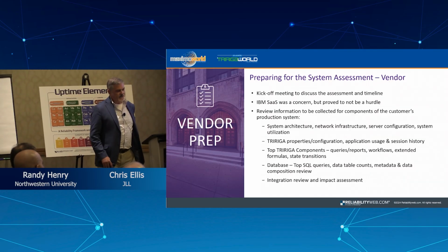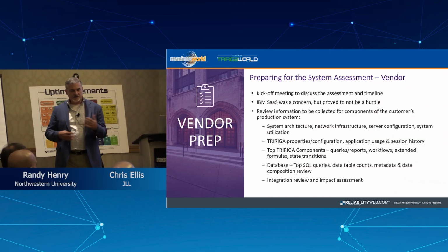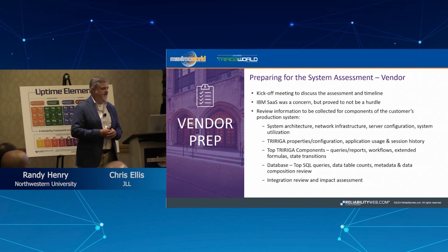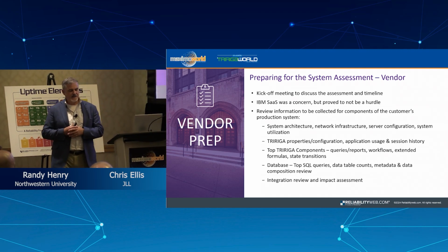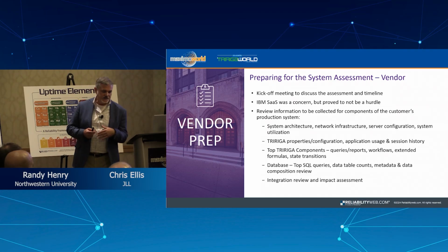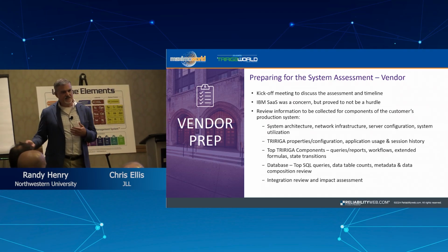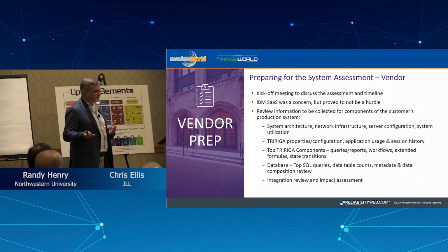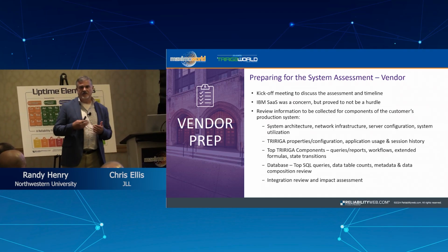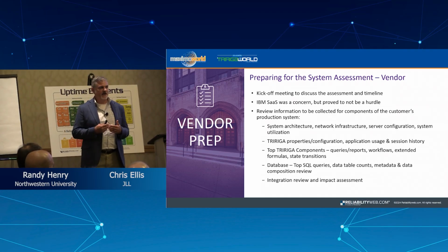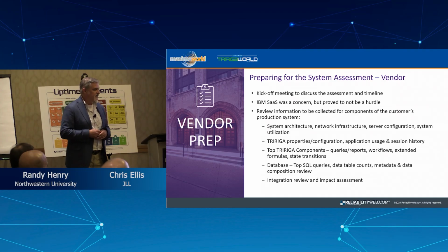Leading into the next steps, they had decided, okay, we're going to do this, and the next step was, how are we going to start this project and kick it off? What I like to do is have a kickoff meeting with the key stakeholders, talk about the process, the timeline, and what we're going to be gathering so that we can get the right people to provide the right information and files that we need.